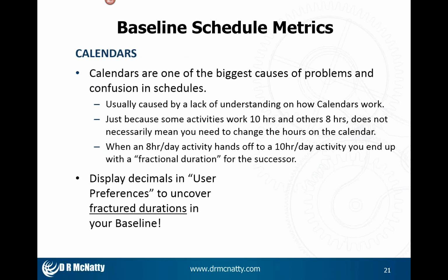Calendars. Calendars are one of the biggest causes of problems and confusion in schedules. And usually it's because of a lack of understanding of how calendars work, especially in P6. I mentioned before that you could import someone's schedule, and if they used a global calendar with the same name as a global calendar you have, your global calendar takes over. It could have different work days, different holidays, and as soon as you calculate, everything goes different than it was when the schedule was actually submitted.